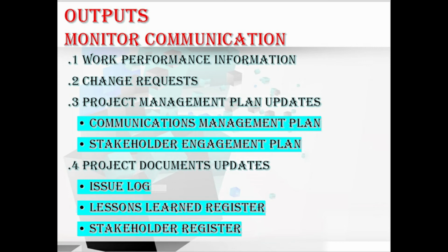We have the change request. As I explained, the monitor communications process often results in the need for adjustment, action, and intervention on the communication activities defined in the communication management plan, and any changes processed through this area have to go through the PICC process, that is Perform Integrated Change Control process. Hope you understood this. Let's move to the next output.